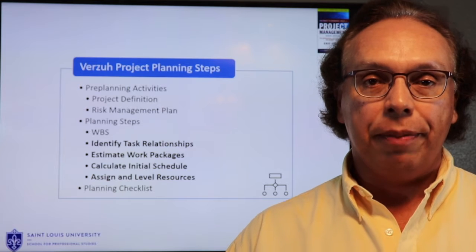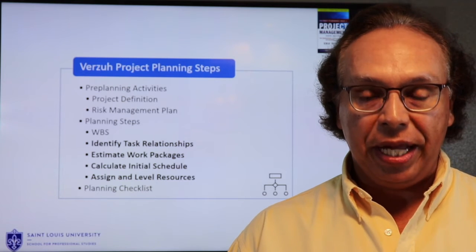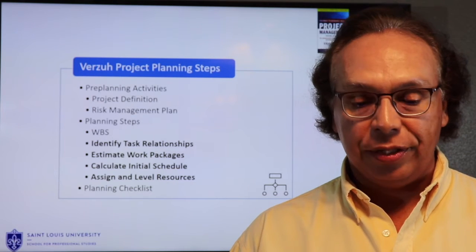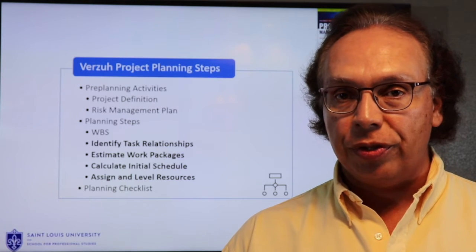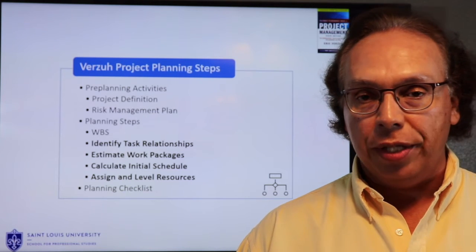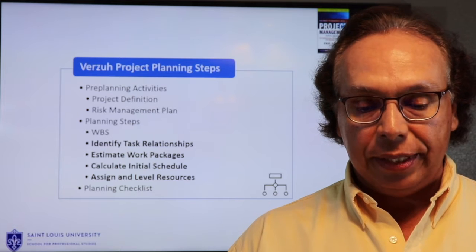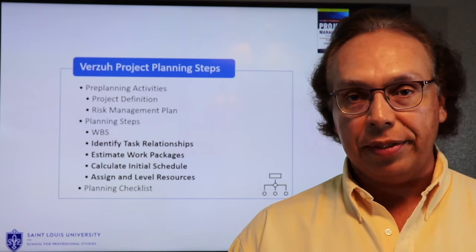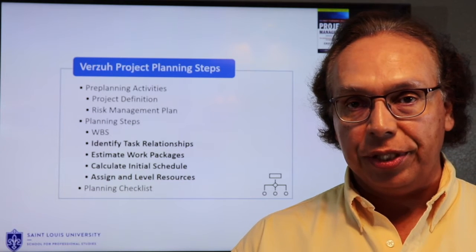Verzu has prepared planning steps that you can use for your projects. Pre-planning activities on page 189 include the project definition that we did in week two with the business case, the stakeholder register, and the assumption log. In week three, we worked on the risk management plan, including the risk register and the RAID log. The planning steps on page 190 include number one, the work breakdown structure, which we just completed in week four. If your WBS is task-oriented, you can move to the next step. If your WBS is only deliverable-oriented, you'll need to define the activities and tasks before moving on.